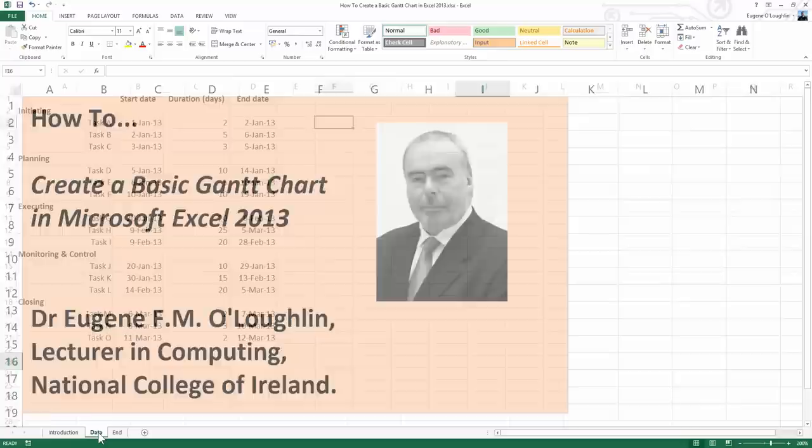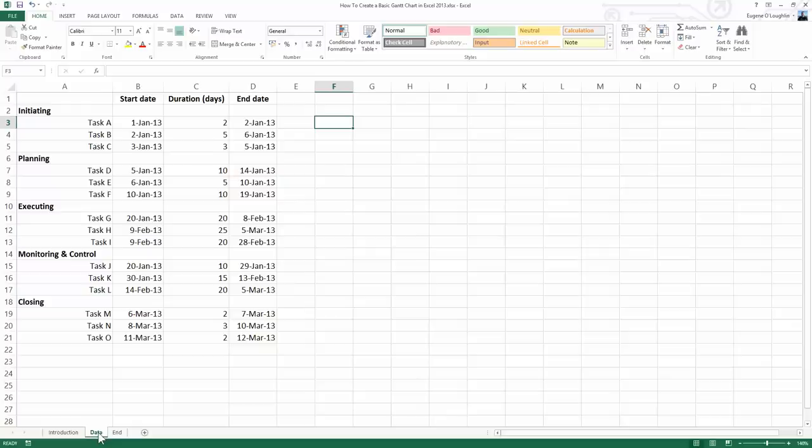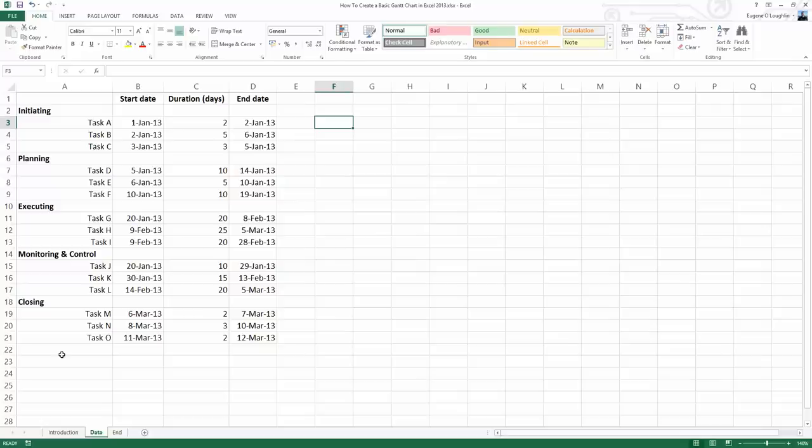Before we draw the chart, let's look at the data needed to make a Gantt chart. In column A, I've got all my tasks listed. They're represented by letters of the alphabet and grouped into categories representing the five main project management process groups: initiating, planning, executing, monitoring and control, and closing tasks. For simplicity, I've allocated three tasks to each process group. For each task, in column B you'll see a start date, in column C a duration, and in column D an end date. Note that for my five headings, I've got blank cells in columns B, C, and D, so if you want headings on your Gantt chart, just leave those blank.